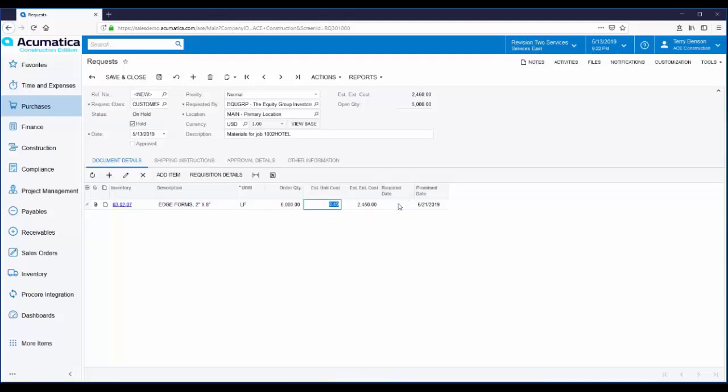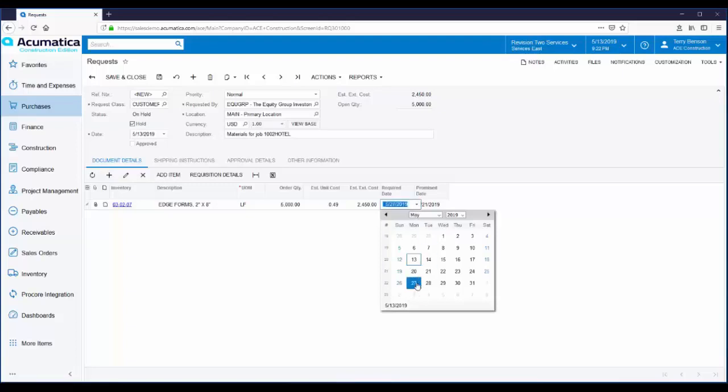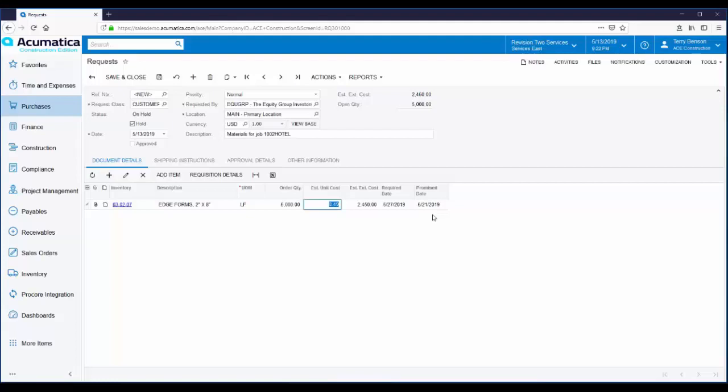Over here to the right, we have a field for Required Date. This is the date that the requester would like to have these items at the job site. Right next to it is the Promise Date. This date is auto-calculated based on a user-defined lead time. You can build in some lead time for purchasing so that expectations are set right from the beginning.